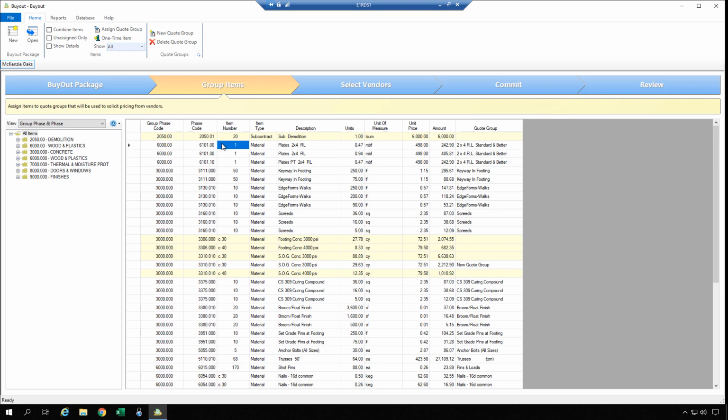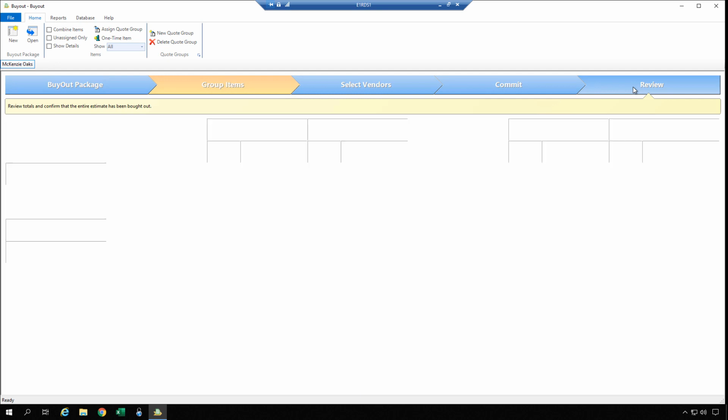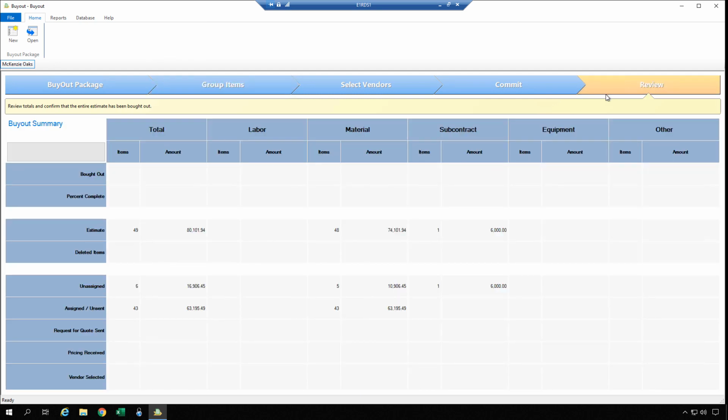One thing I do want to do before we end this video is just to pop into the review tab real quick. Even though this step appears at the end, you don't have to wait until the end of the process to jump to that and see what's there. So the point is that this is just giving me an overview of the entire buyout process for this buyout package. And the first column here for the total shows me that there are actually 49 items that came from the estimate, amounting to $80,000 worth of estimated cost.